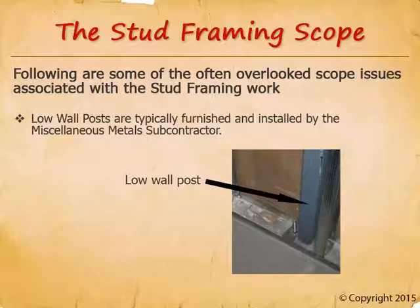Low wall posts are not always shown in the drawings, and we need to deal with it. The best way to win a debate is to prevent it from occurring in the first place. When you see a freestanding wall that you know needs steel posts, include them in your bid. For hard bid work, if you include something your competitors aren't smart enough to include, your bid will be higher and you could lose the job — a lose-lose position.